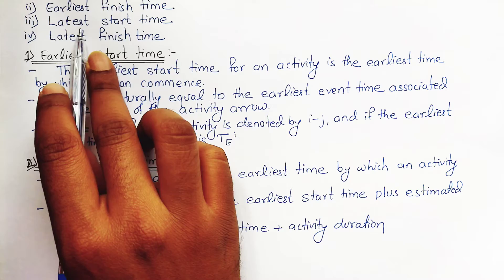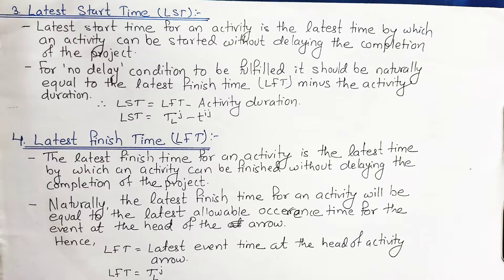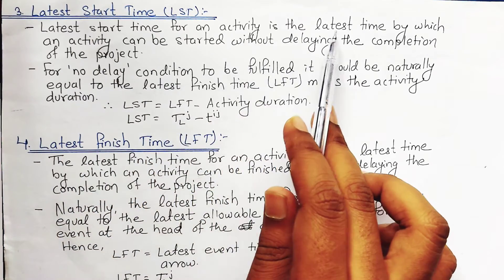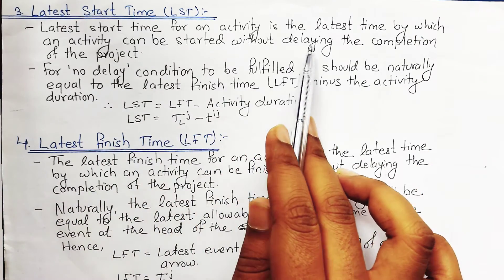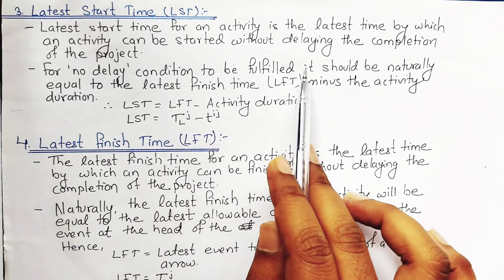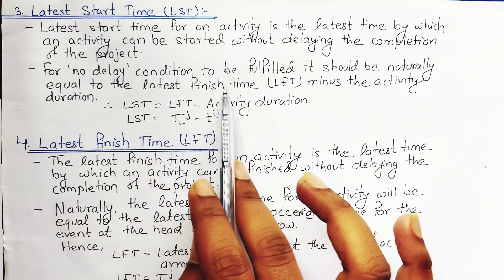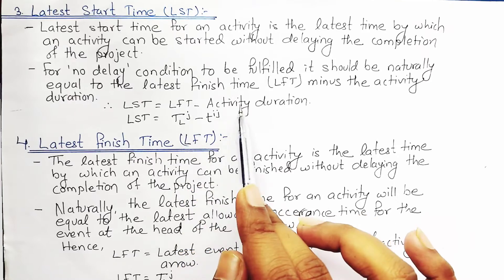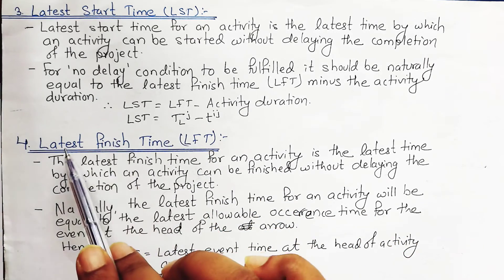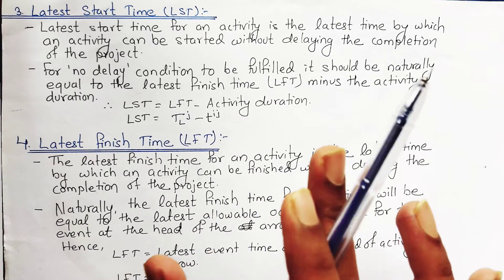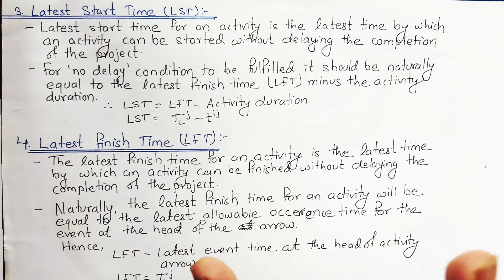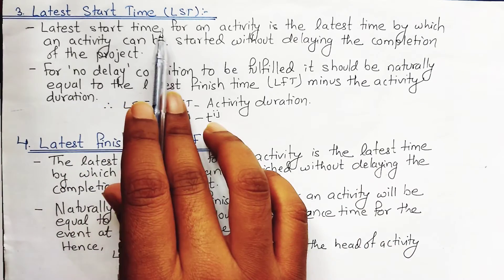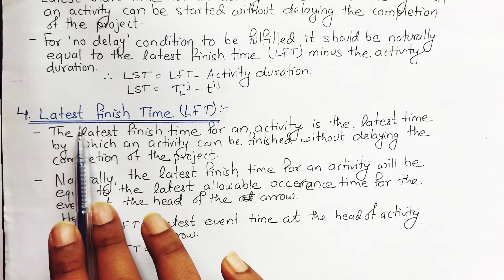The Latest Start Time (LST) is the latest time by which an activity can be started without delaying the completion of the project. It should be equal to the Latest Finish Time minus the activity duration: LST = LFT − t(IJ), denoted as T_L(J) − duration. This ensures that even if we start some activity late, the project completion is not delayed.